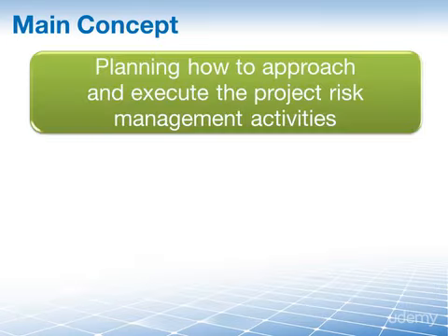The main concept that you should remember is that in this process, we are not interested in planning how you will be managing the actual individual risks. Instead, we are interested in planning how to approach and execute the risk management activities overall on our project. You decide on and plan for activities that will help you execute project risk management.